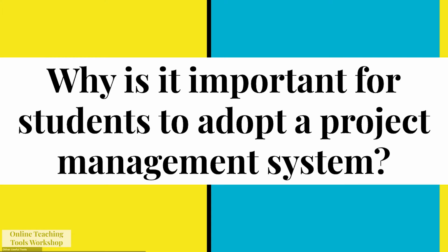Project management. Okay, so projects usually entail having anywhere from a simple to an elaborate plan that concludes at some point, right? And if that plan has a lot of parts, components to it, they have to be managed. Who's going to do them? When do they need to be finished? Especially if some components are dependent on others. If we have a deadline of the 17th and component B is dependent on component A, then clearly component A has to be finished ahead of the deadline so that component B can start.